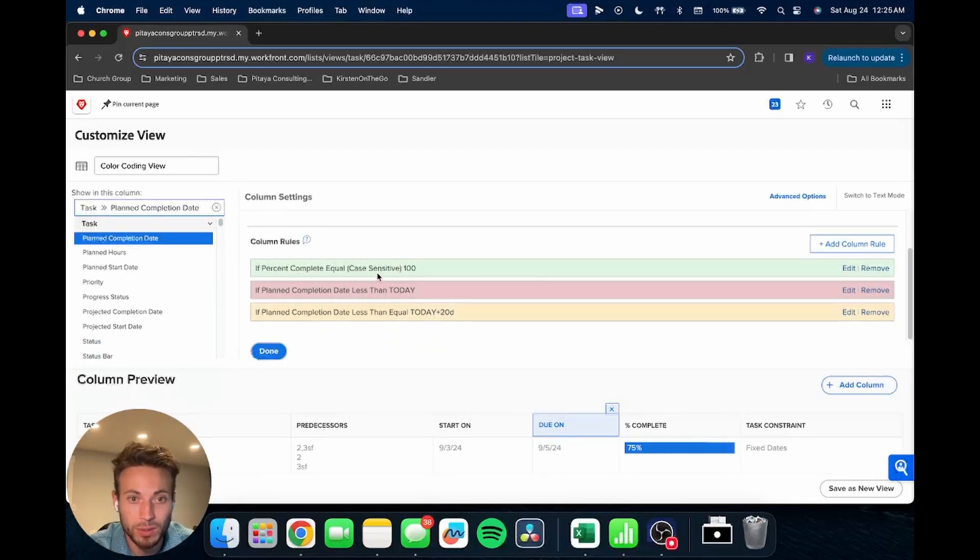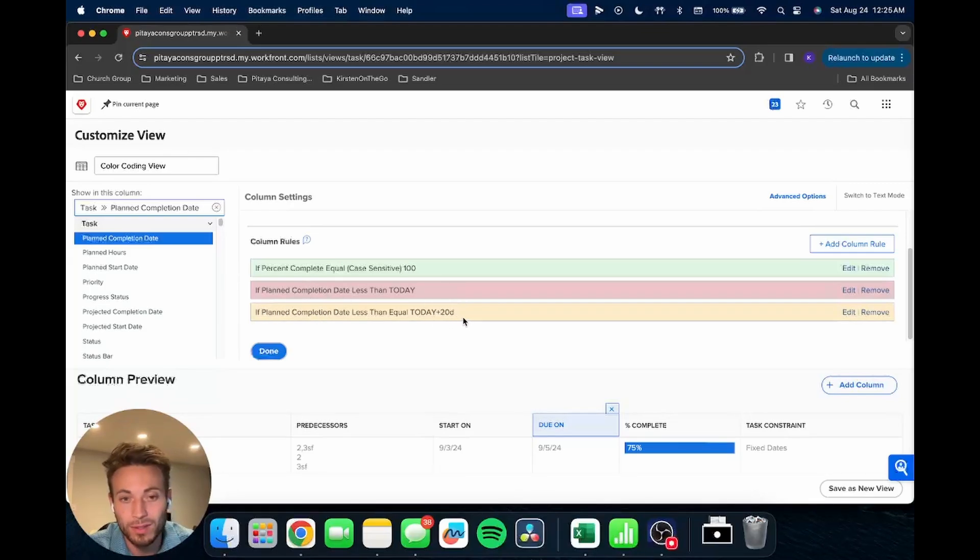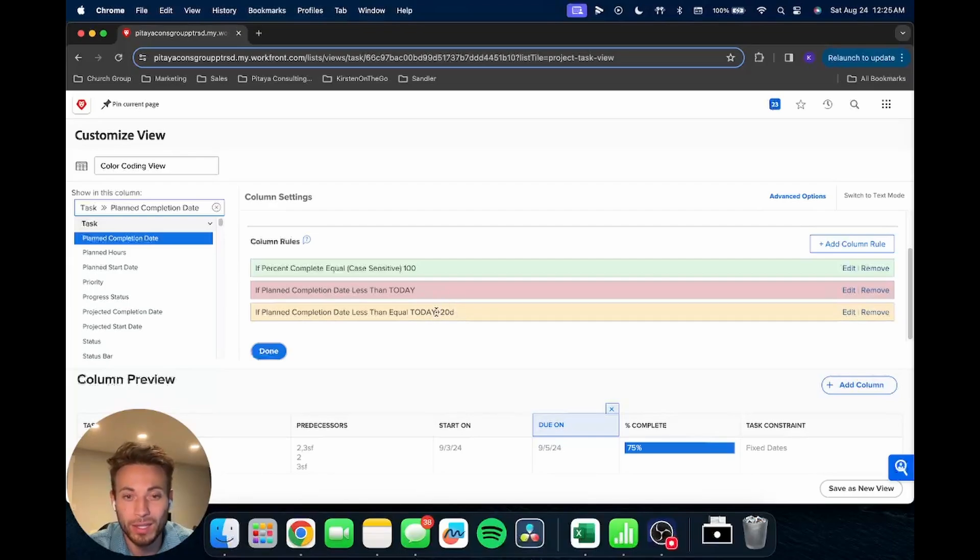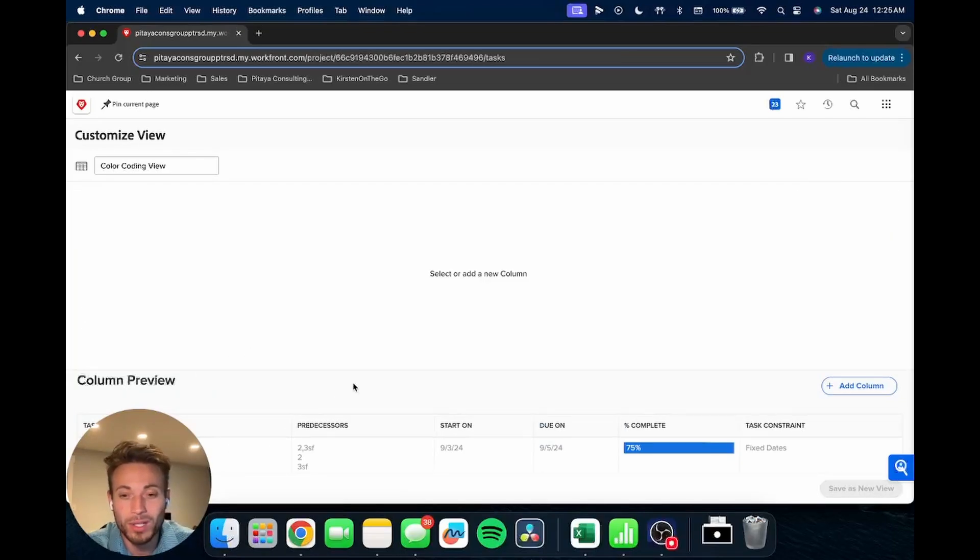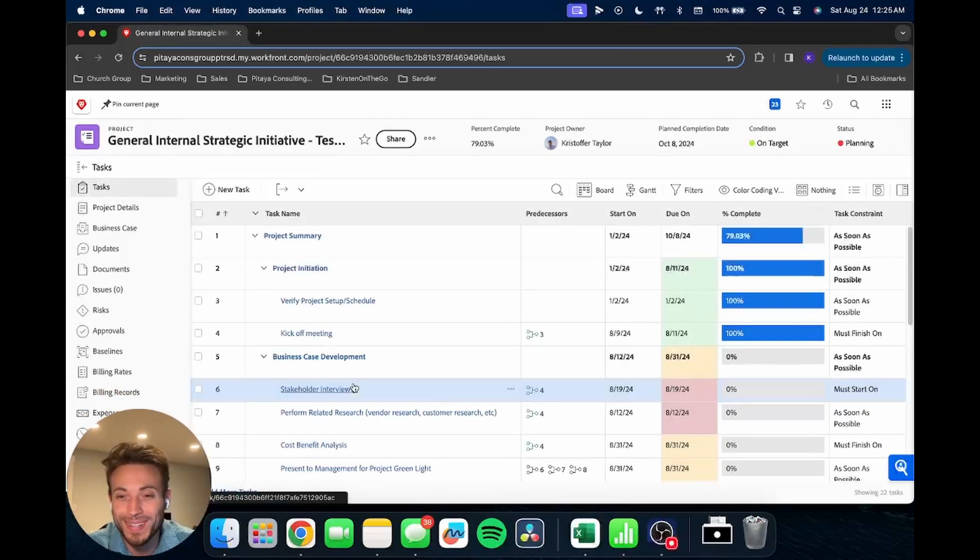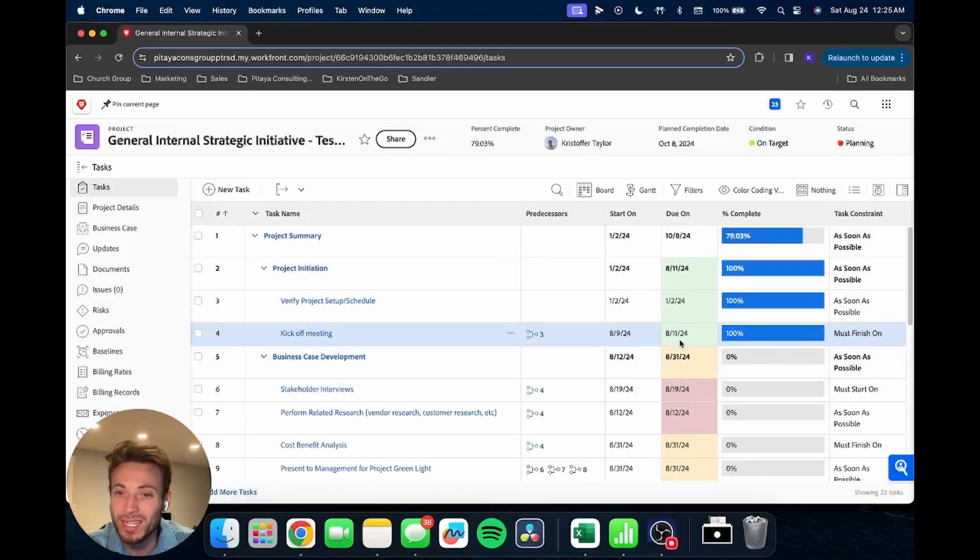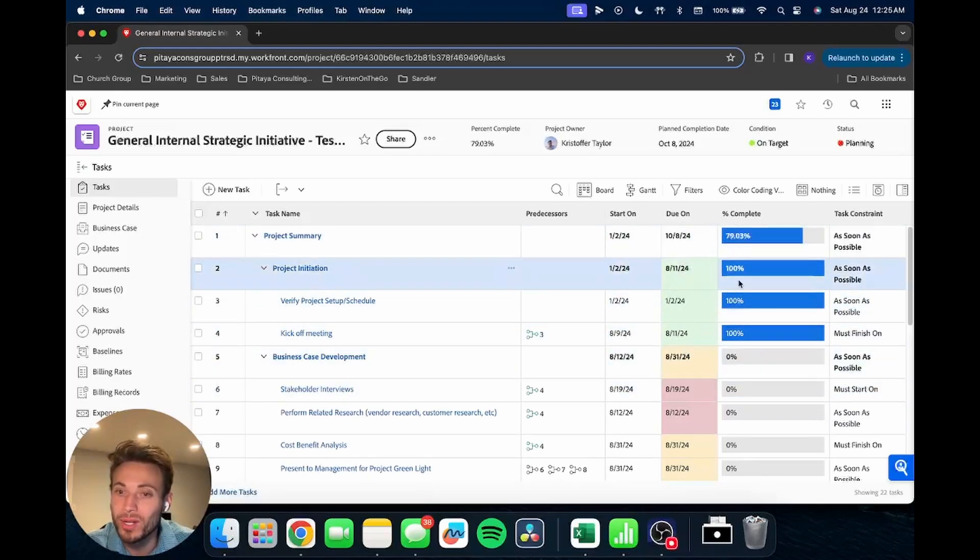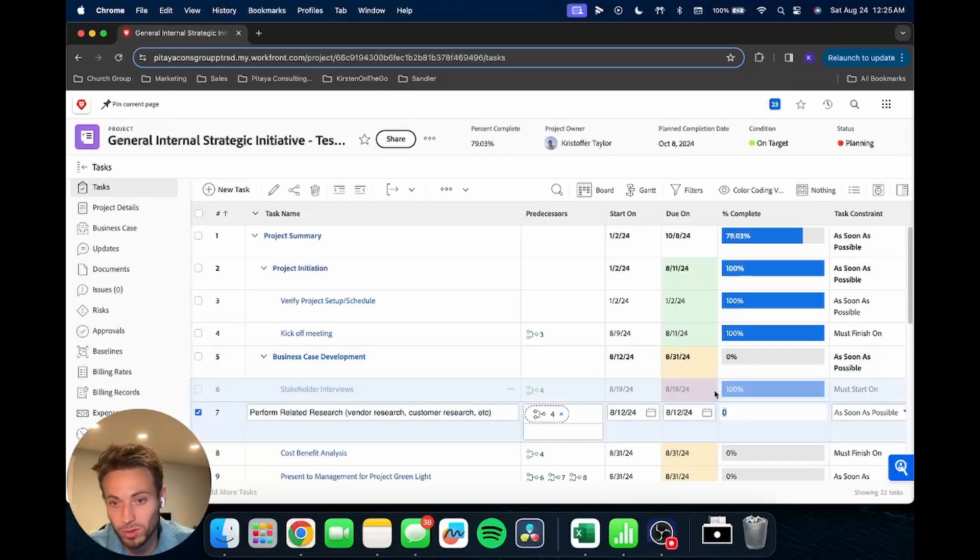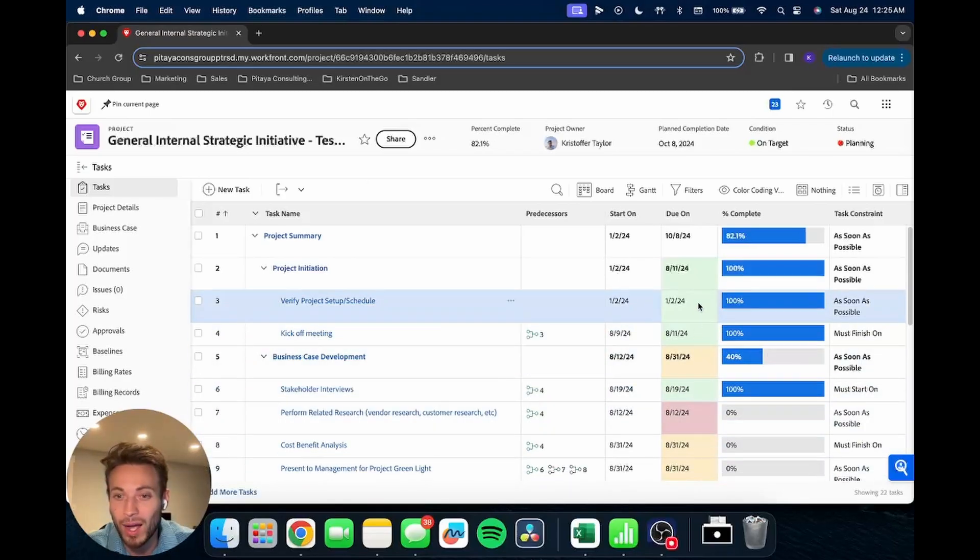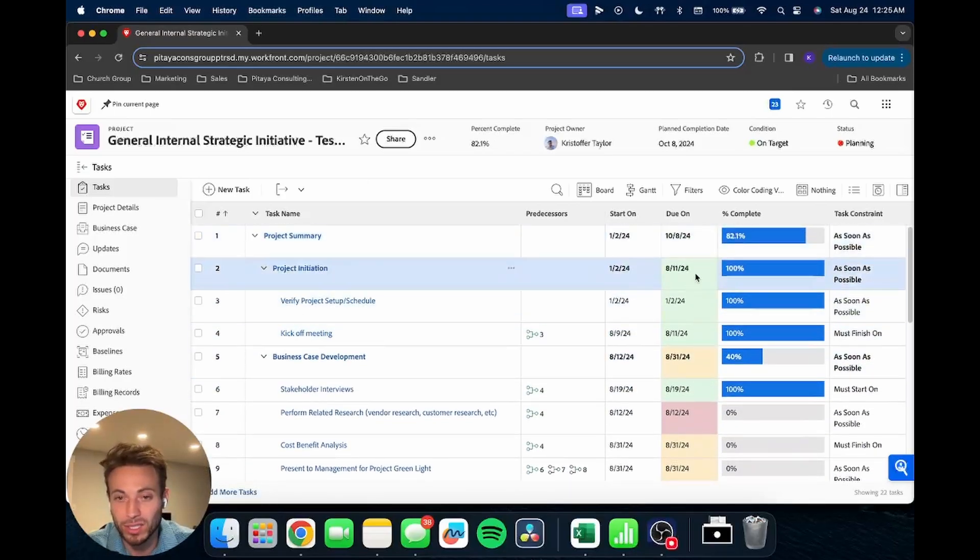If it's 100% complete, make it green. If it's late, make it red. If it is coming up within the next 20 days, make it yellow. Now let's see if this is going to work. And there it is. Okay, so that's how you fix that issue. See, now these are showing up green because they're complete. Now if we mark another one complete, instead of being red, we'll switch that green color, and that just makes it a lot easier.